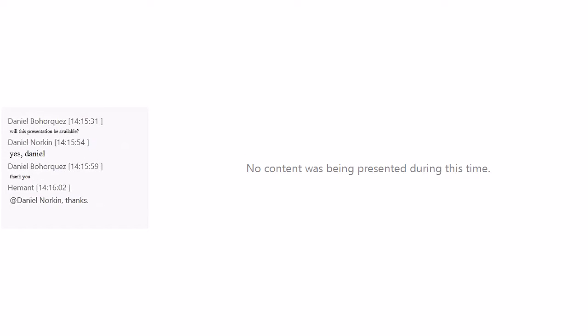Understand that each of these items rolls up to the story. Stories roll up to sprints. Sprints roll up to either features or versions or releases, or all of them at the same time. And then that would roll up to epics or themes, and then that would roll up to projects or portfolios. So that's basically how it breaks down as far as the Agile data model.